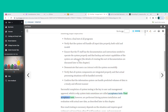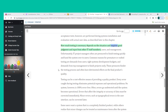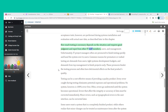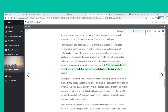Final acceptance tests are performed during systems installation and evaluation with actual user data. How much testing is necessary depends on the situation and requires good judgment and input from IT staff, users, and management. Unfortunately, IT project managers are often pressured to finish testing quickly and hand the system over to users. Common reasons for premature or rushed testing are demands from users, tight systems development budgets, and demands from top management to finish projects early — pressures that often have detrimental effects on the final product's quality.